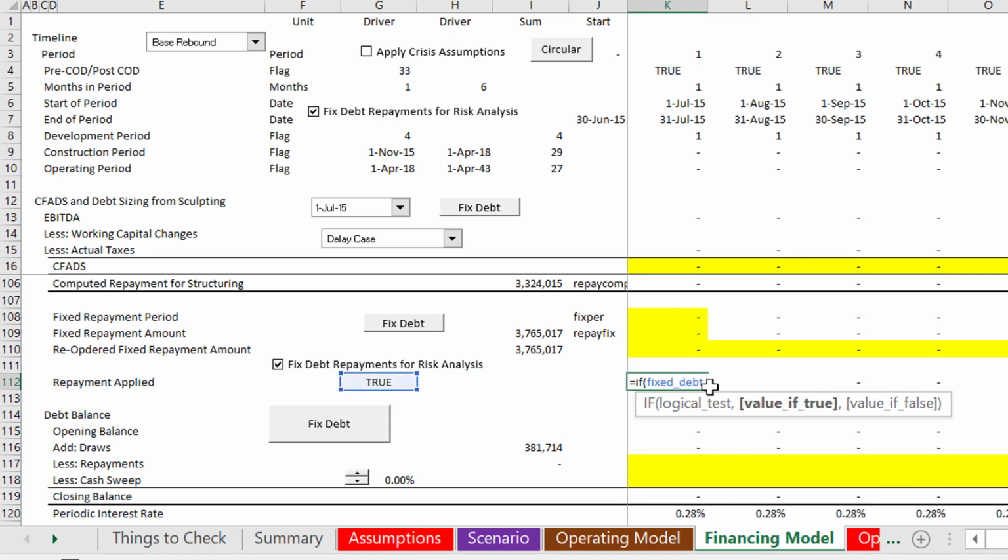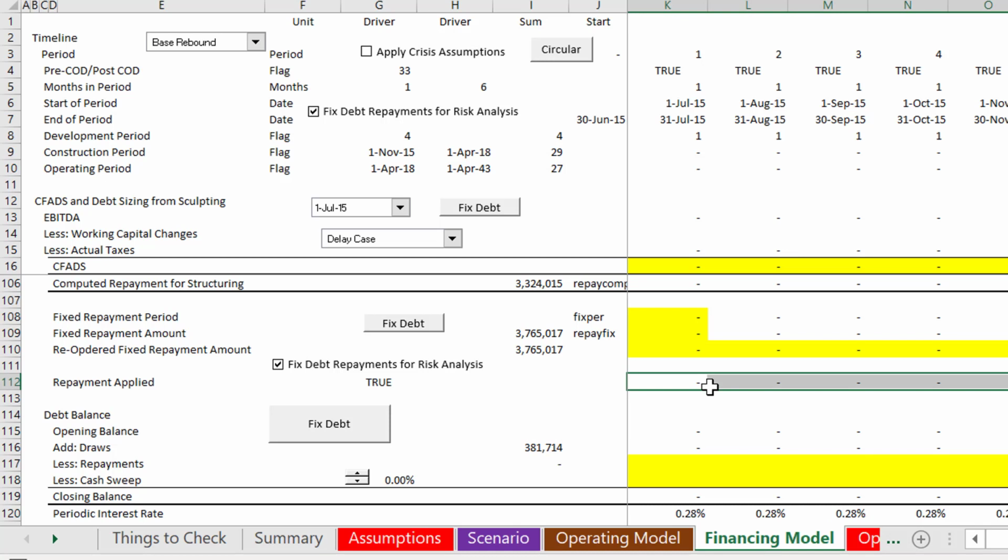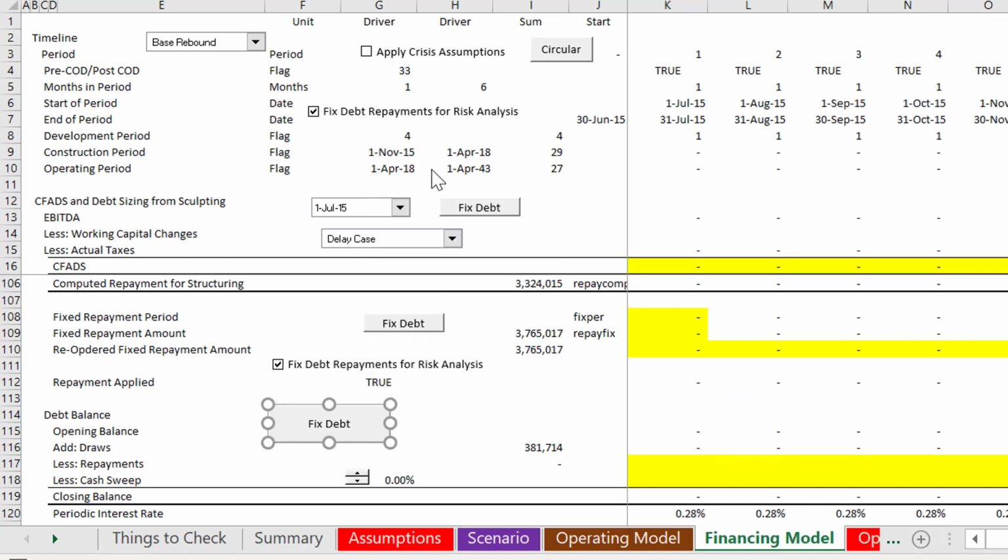that seems to be a range name. If it's fixed, then we're going to use this reordered whole business. Otherwise, we're just going to take the initial one, which was the dynamic one. And of course, you could add other repayments here, but this dynamic versus fixed sculpting, and when I see these models, everything else is kind of all nice, and then that sculpting becomes a mess.